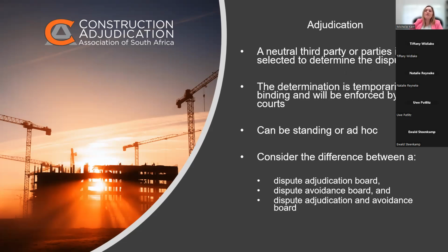He's not just there to facilitate their discussions and tell them where they're being a little bit unreasonable and suggest they make compromises. He's there to listen to both sides. He has his inquisitorial authority, where he can ask questions, he can request further documents, and then he makes a binding decision.